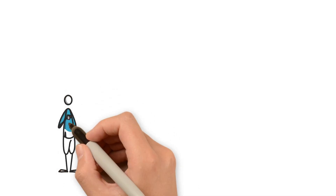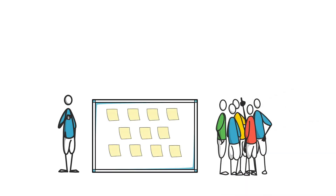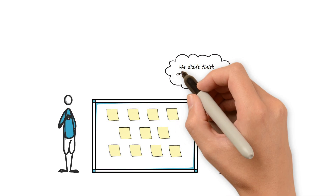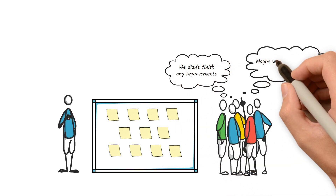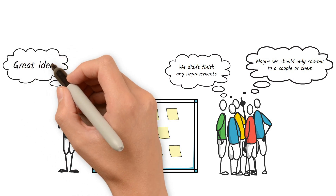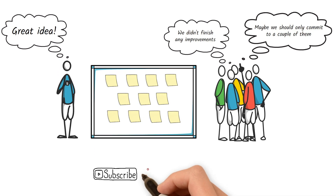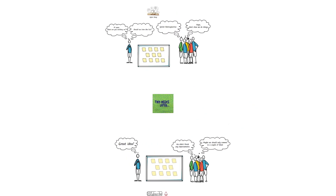Two weeks later, when they came back together for another sprint retrospective, none of the items from the prior retrospective were addressed. They realized they were not able to move the needle on any improvements because they were trying to solve too many things at the same time. Now that they came to the same conclusion on their own, they only committed to a couple of improvements in the next sprint retrospective. This time, they were able to accomplish it within the next sprint. In conclusion, sometimes teams need to come to their own conclusion in order to commit towards something, even if that means small failures. Thank you for watching and let me know in the comments below if you want to hear more Agile stories in future videos.